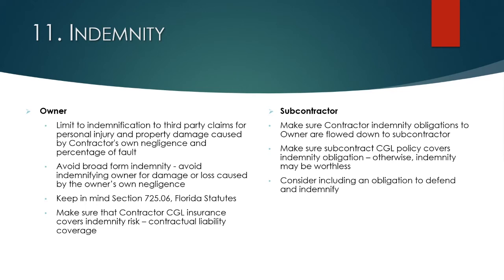Defending is just simply saying, I'm going to defend you if there is a claim that triggers my indemnity obligations. It doesn't necessarily mean that I have any obligation to pay you any amounts that you are claimed to owe. So that duty to defend, in the insurance context anyway, is much more broad than the indemnification, the payment obligation, but there is a difference.